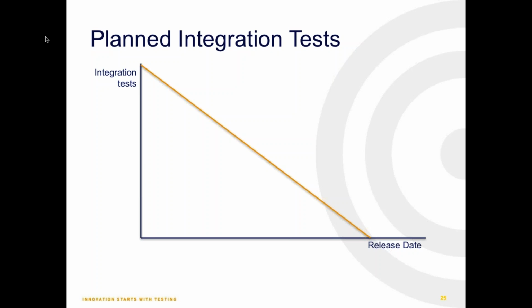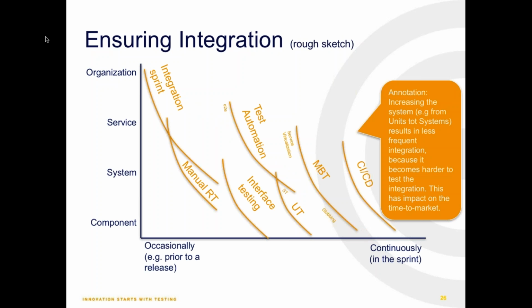And we put responsibilities very low within the different parties and say, if you change something on the interface, seek the team on the other end of the interface and organize yourself with them how you're going to test the interface. And what you're going to test and how you're going to test is your thing because you're the specialist. But we want to know whether you think the interface has been tested. And that's very difficult for a lot of teams who are struggling with that. And integration is very difficult.